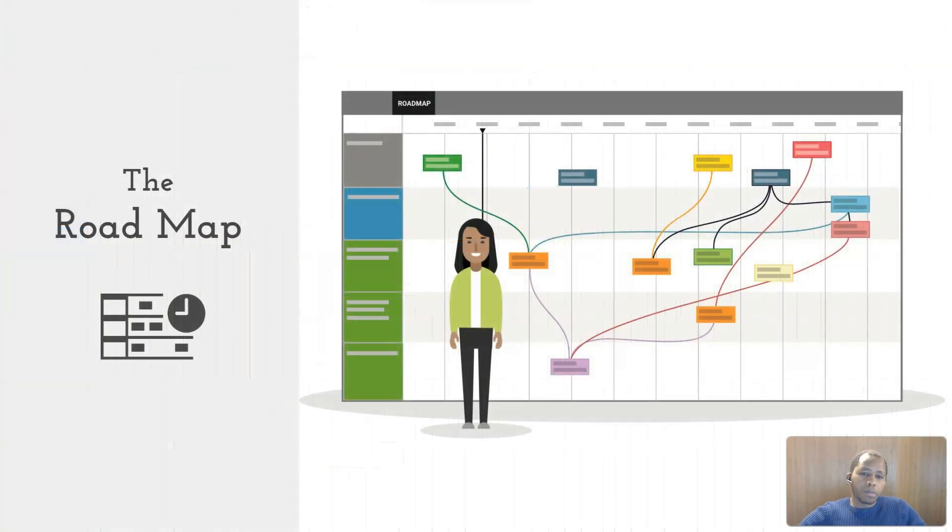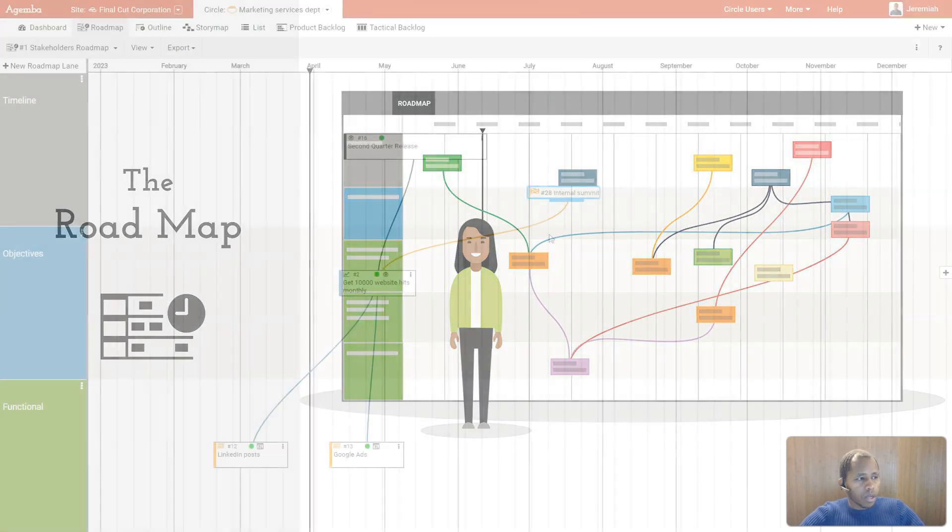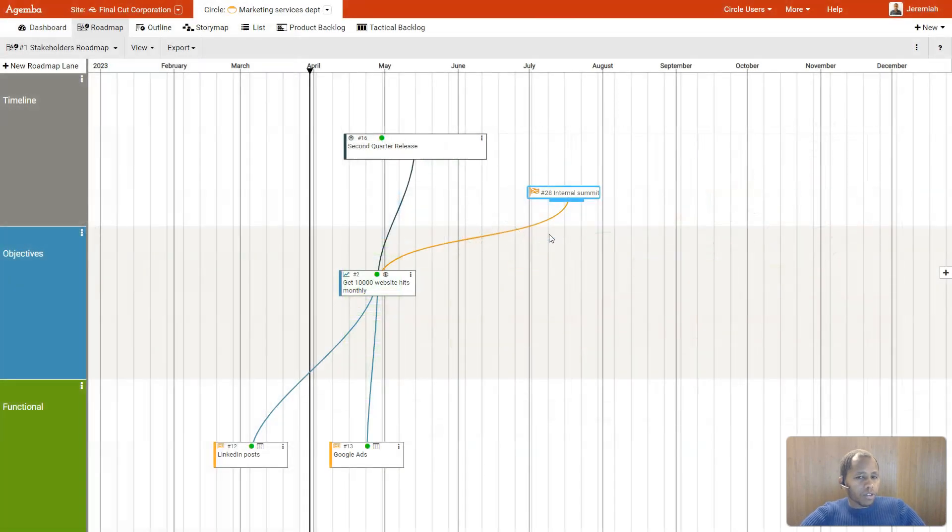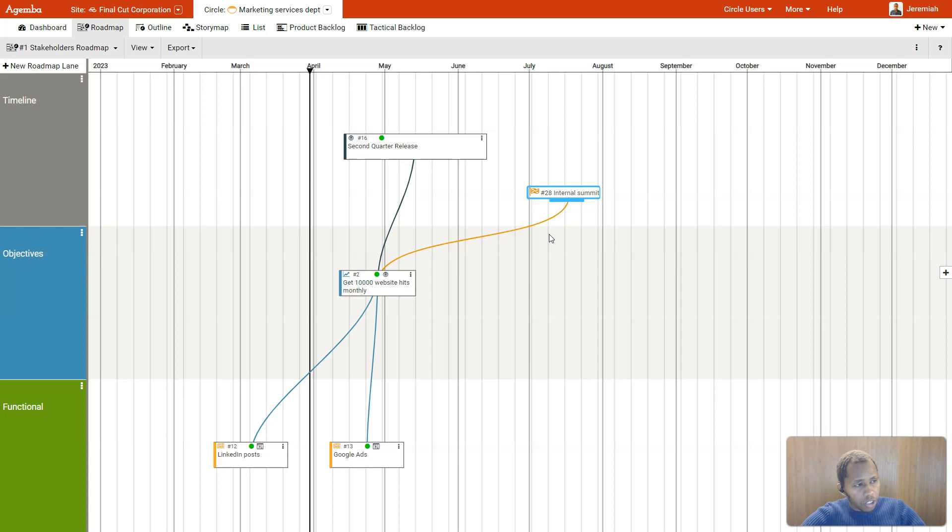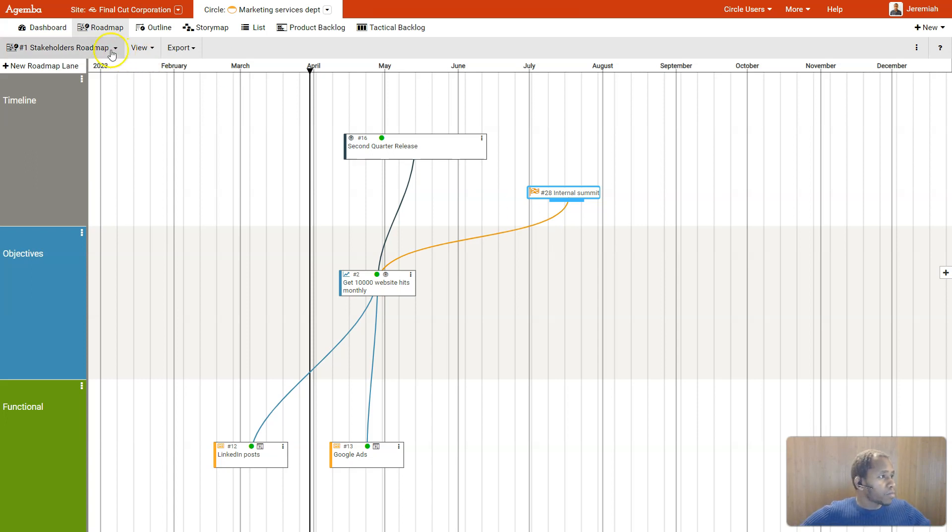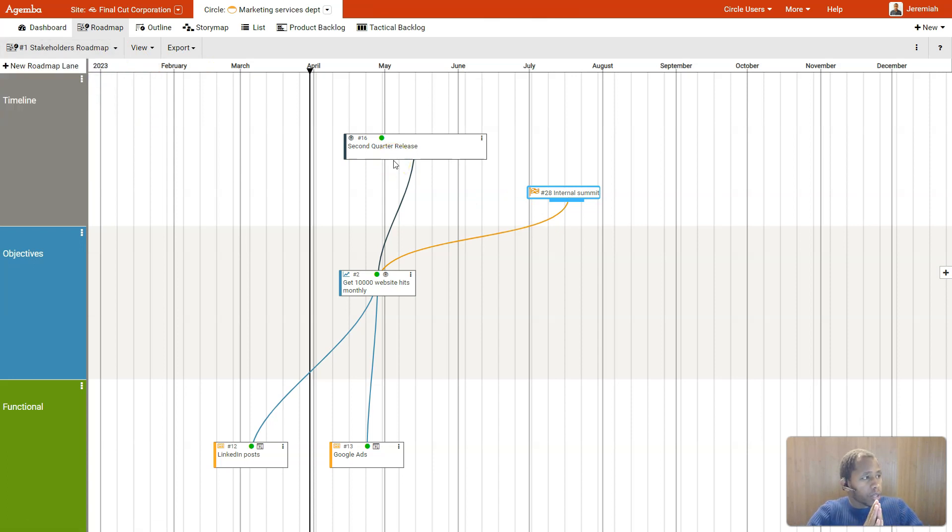While the story map is a good place to begin mapping out your project, the other views provide the necessary time perspective. In the roadmap for instance, you can keep track of your long-term plans and deadlines and compare them to any of the milestones within the project. For each project, you can create multiple roadmaps if you want to highlight different aspects of the project to stakeholders, decision makers, or teams.